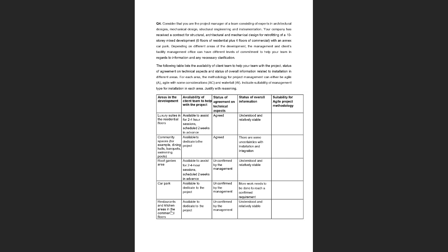Okay, so by working out the technical details, you have to first confirm that these two areas of development can be treated independently as independent work packages. And only if that is confirmed, then you can employ agile methodology to these two work areas. Does it help a little bit, Ellen, or